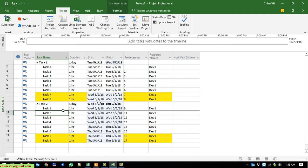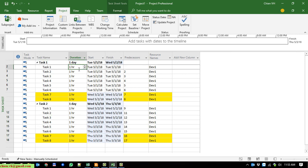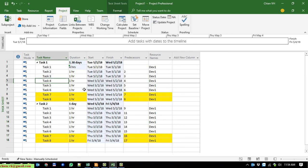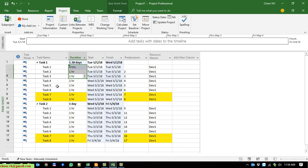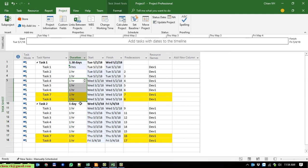Now if I increase the hours for sub-task 1 — for example to 4 hours — the other tasks shift as well. Sub-tasks 1, 2, and 3 now total 6 hours, filling day one. Sub-tasks 4 through 8 are only 5 hours, so they fall on day two, with 1 hour left over. That means the first sub-task of Task 2 also moves to day two.